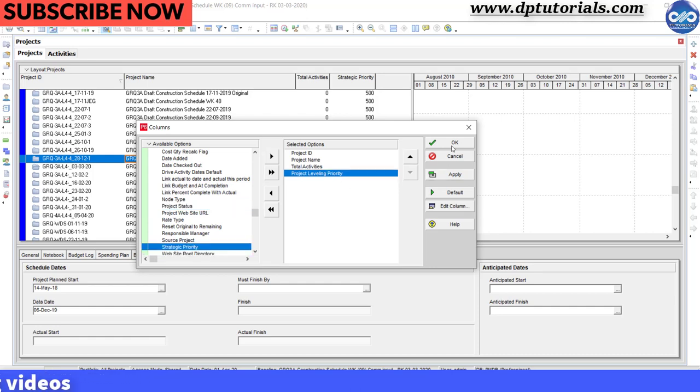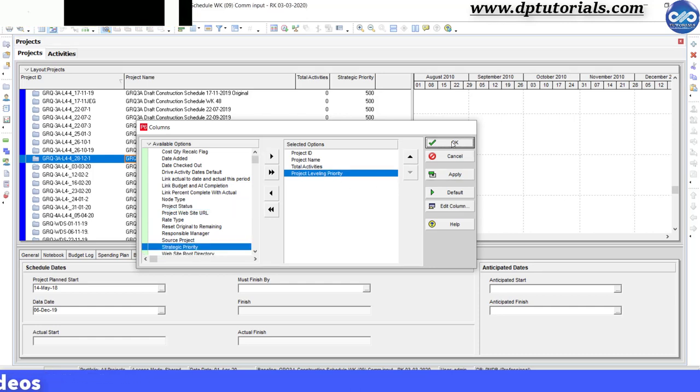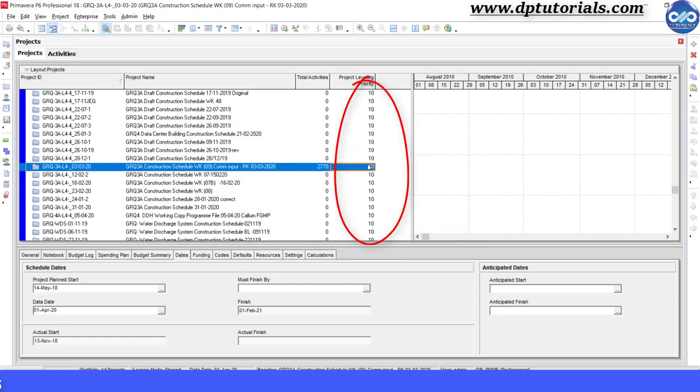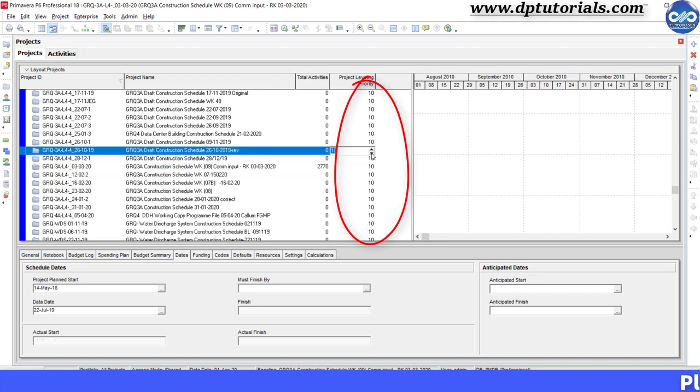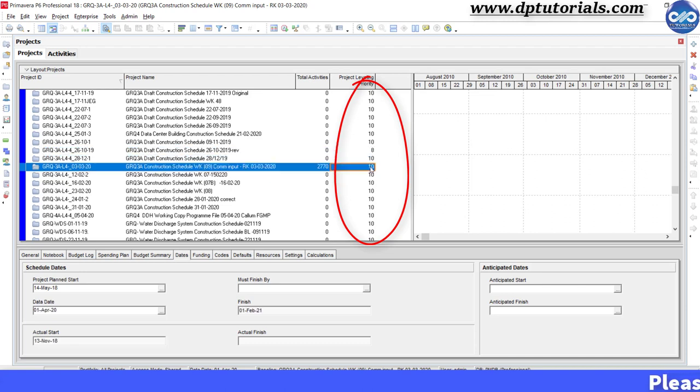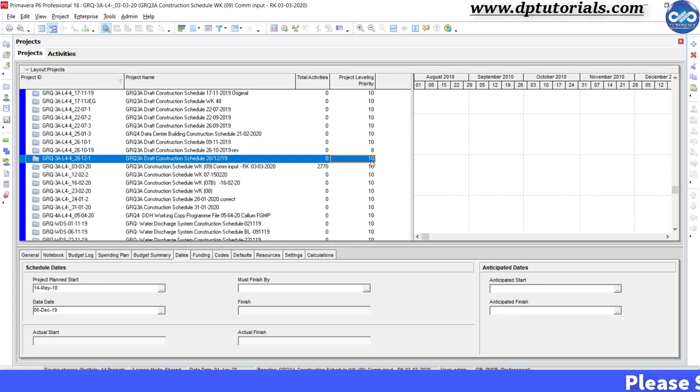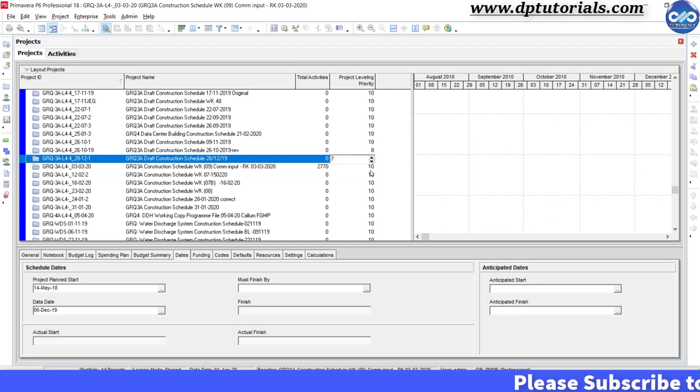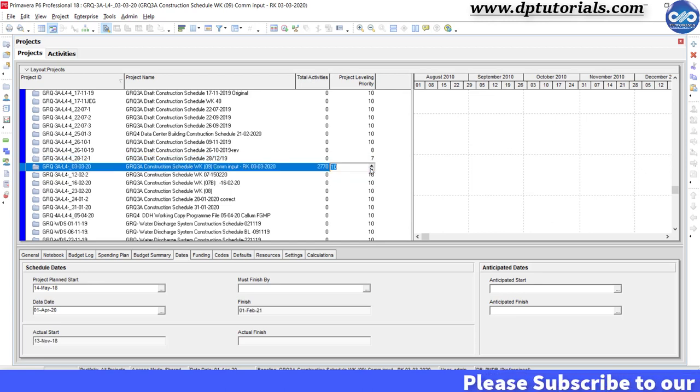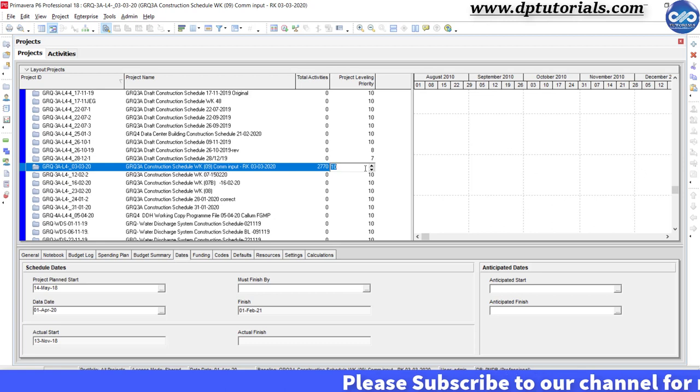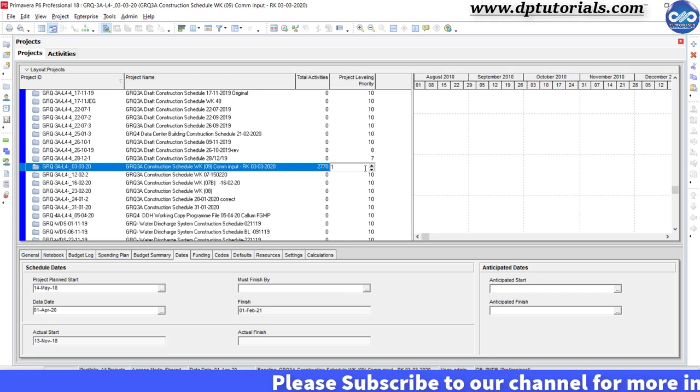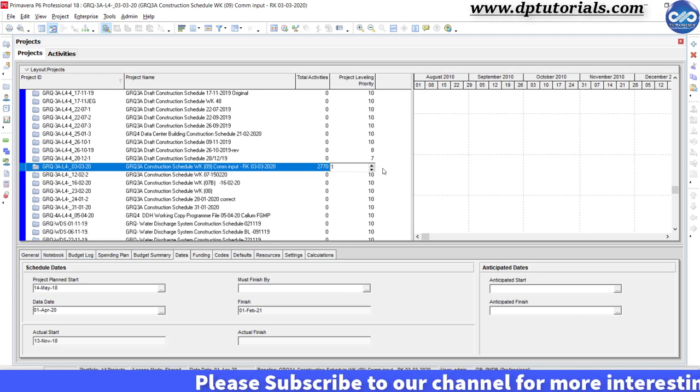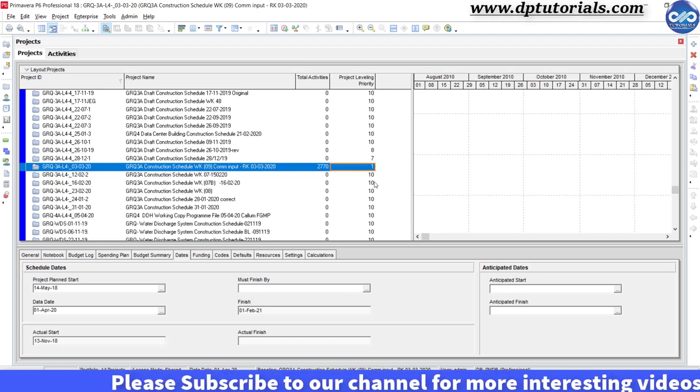This will allow you to set a number against each project that indicates its priority. The lower the number, the higher the priority. So I am giving this high priority project as 1, and the rest I can keep as 10 as of now.